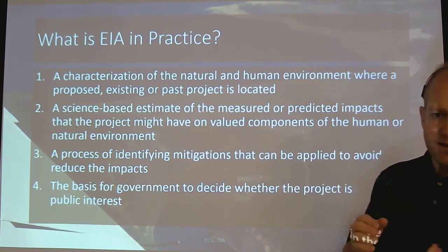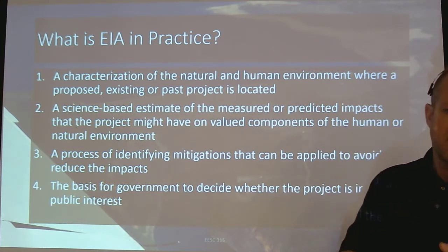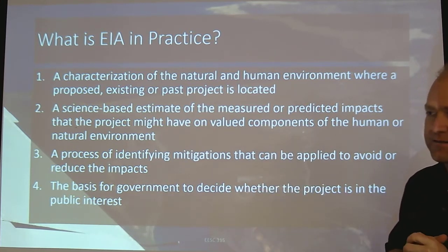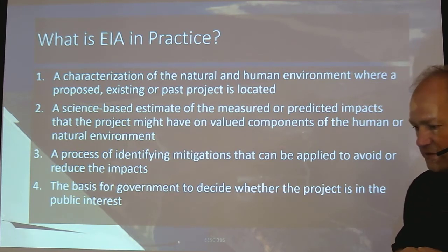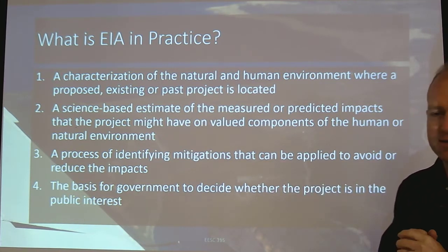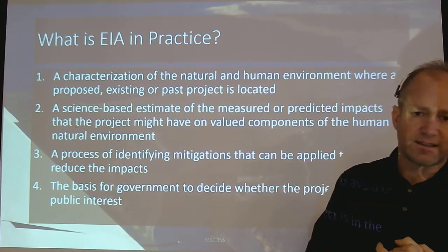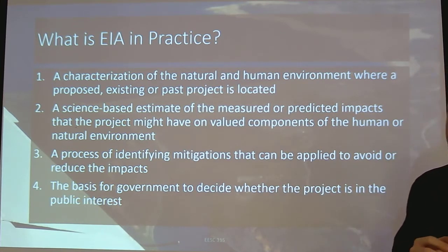That discharge would have coliforms, nutrients, metals, a whole suite of parameters that we would look at. When this sewage treatment plant was proposed, somebody would have looked at the phosphorus and said, look, this will change the trophic status of the lake. Let's implement phosphorus removal, and that's what they've done.